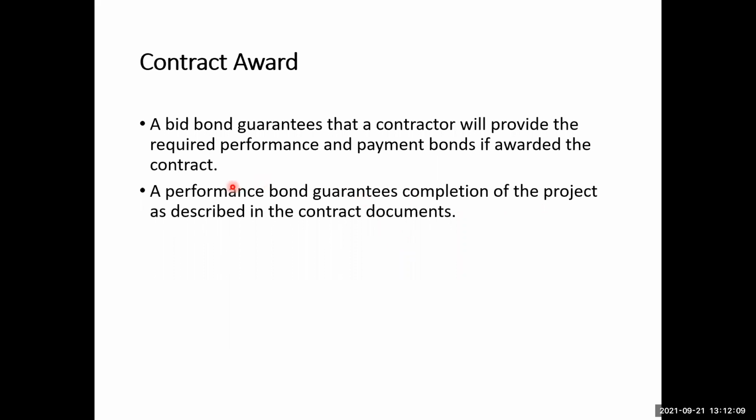Remember where these bonds are obtained: a contractor can obtain those bonds from financial institutions, such as banks or other monetary organizations. They can use them as insurance, because those monetary organizations have financial information and other assurances from the contractor which the original client may not have. So, on the authority or guarantee of the financial institutions, the client can believe in the authenticity of those bonds. Therefore, the main purpose of these bonds is to ensure that the contractor will perform on those projects.